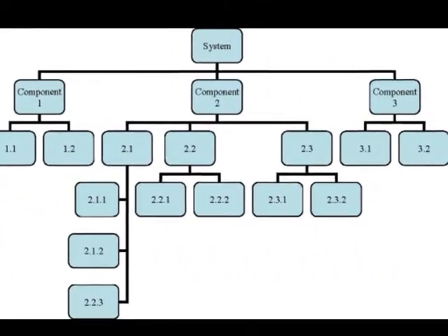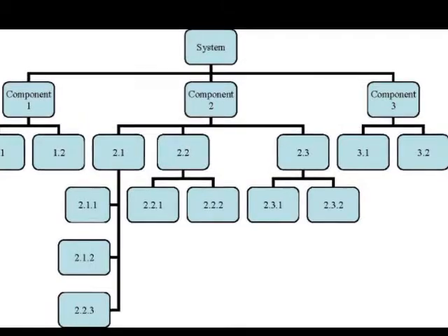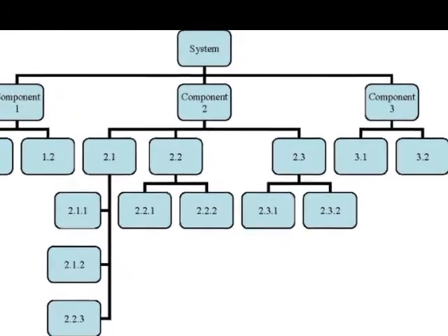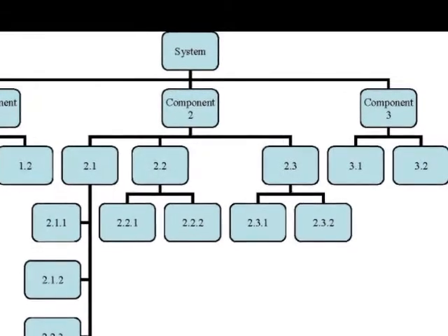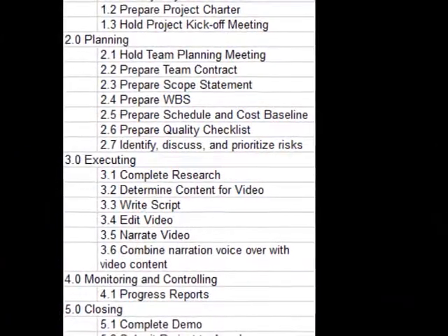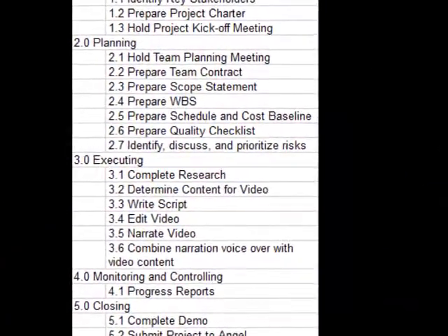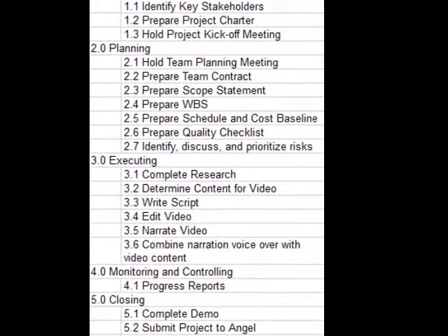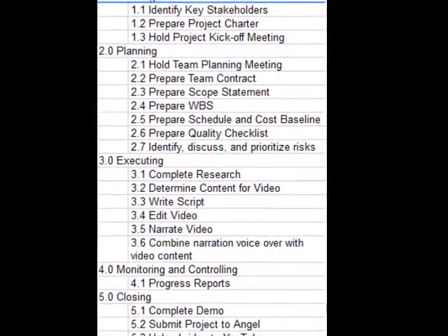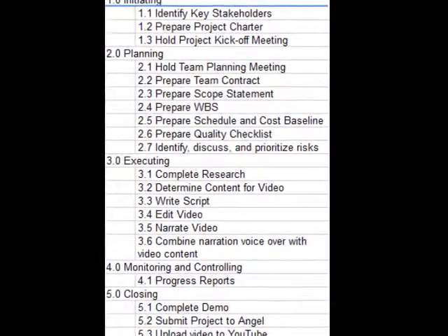Gathering requirements might be on the WBS along with the other typical software development steps. List out each of these activities. It could be that one box in the WBS is really multiple activities. Next, we want to order or sequence the activities. Typically, gathering requirements will be first, testing will be after development, and so on.